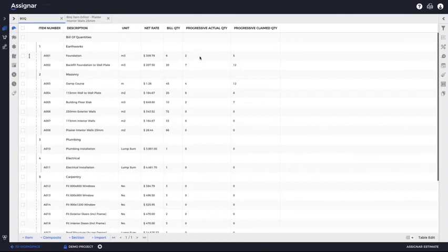And then we can automatically produce your monthly payment certificates based off these numbers, and they can send them off to your client for billing. But more importantly, we can also show you where you are or should be standing from a budgeting point of view. On a resource level, that's really good.